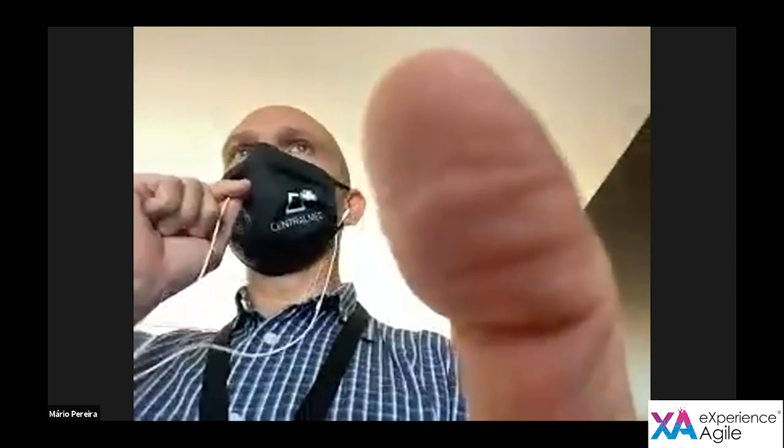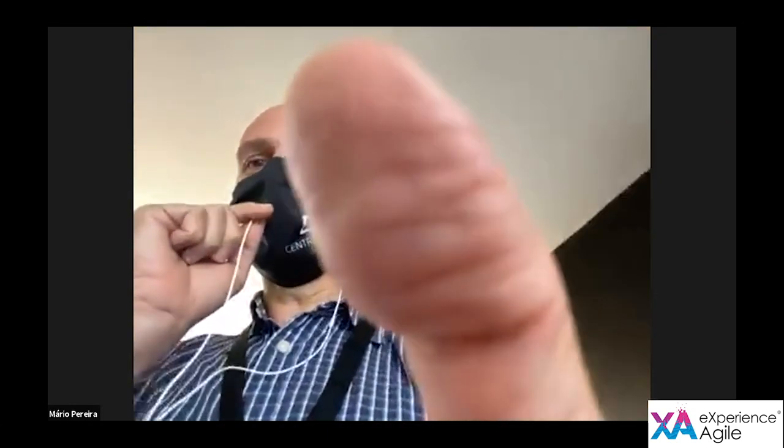Can I complement it or give an example? Yeah, sure. In my particular case, I have a 14 element team and I established the WIP of 10. Why? To force the knowledge transmission. If someone is available and there is already 10 work in progress, he has to choose a partner to work with and absorb the knowledge.